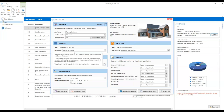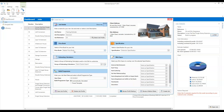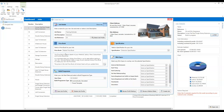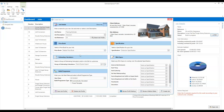We can select the price book we're going to use. Nine times out of ten, Estimator Express users are only using the master price book. The master price book is linked to our online pricing through Price Tracker Plus, so those prices are kept live and up to date. If you create your own price book, you then have to manually review and keep all of your prices up to date. We recommend in most cases to only use the master price book and save yourself a lot of work. Normally you won't have to do anything where it says price book.